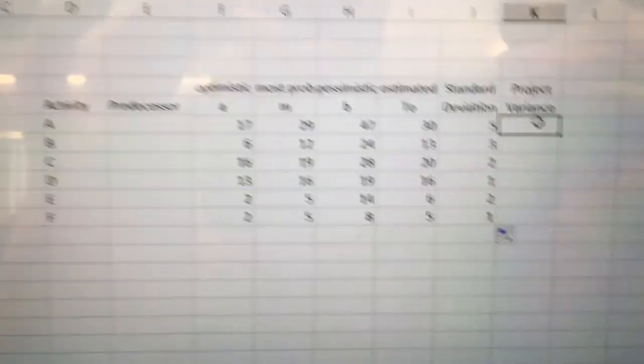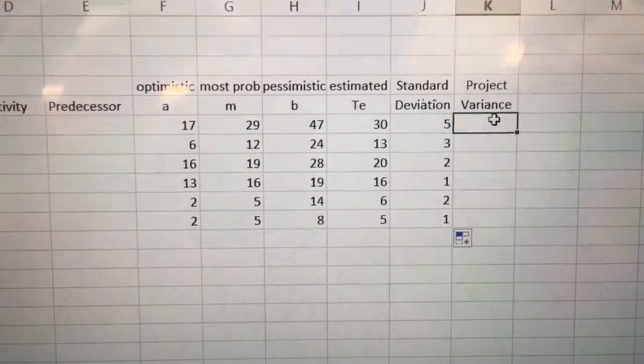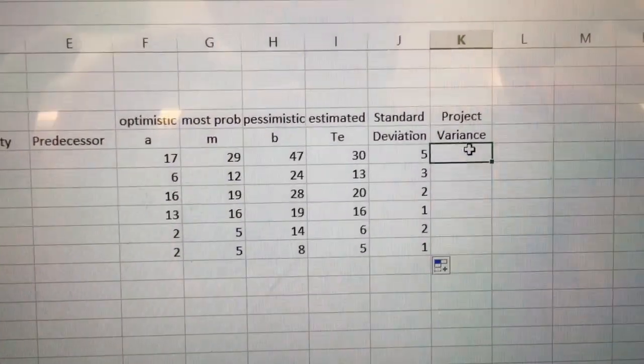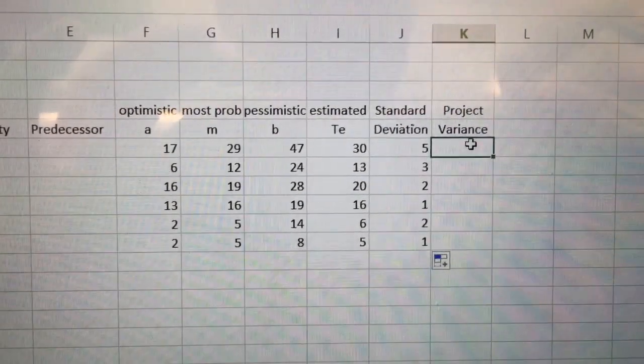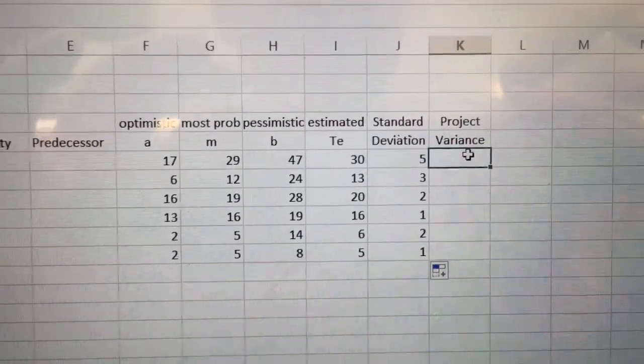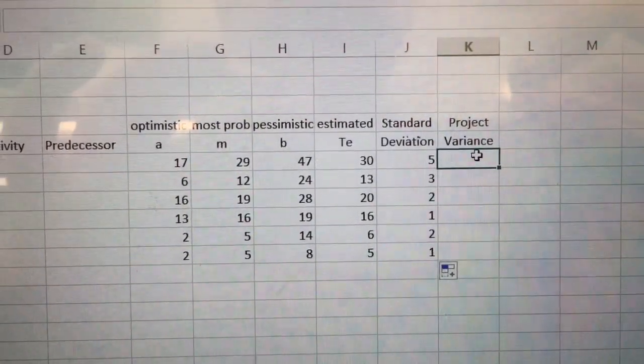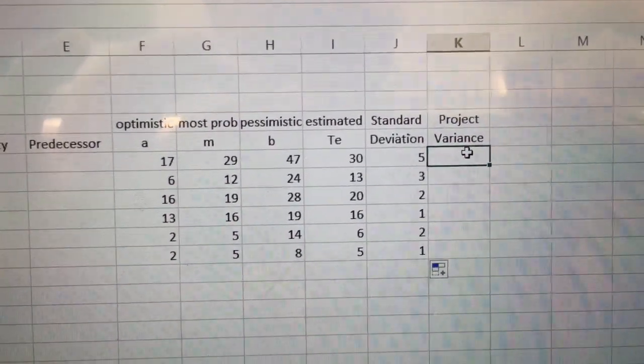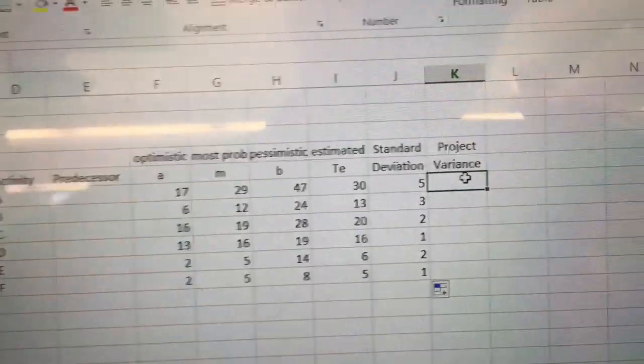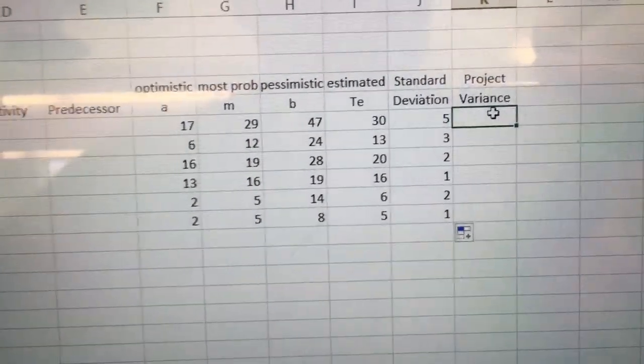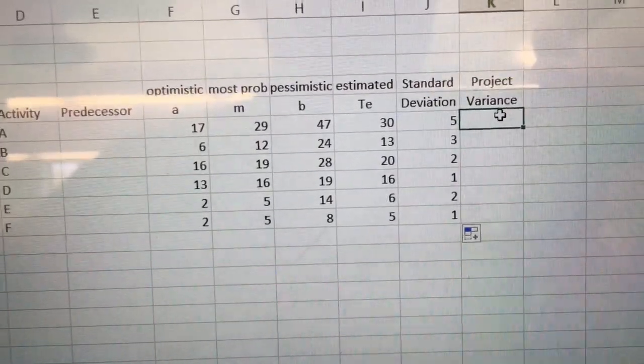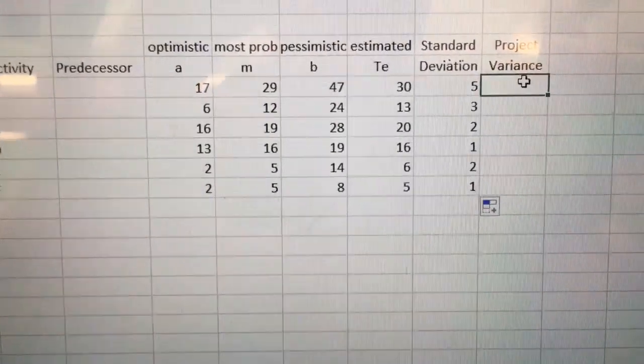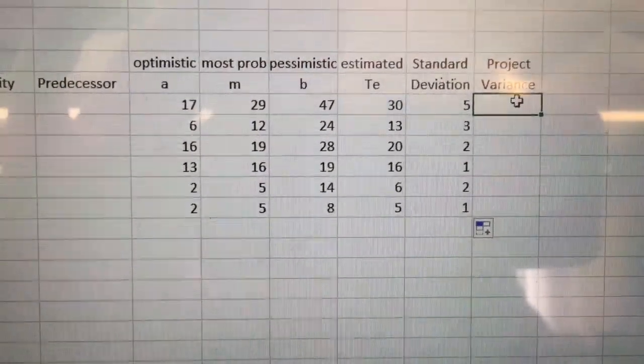Project variance. To get my project variance I'm going to take the sum of the critical path items. Actually the sum of the critical path standard deviations. Well make it even more complicated. I'm going to take the sum, well the square root of the sum, of the standard of the, scratch that part. I'm going to take the square root of the sum of the standard deviation squared for the critical path. Doesn't make sense, stick with me. Basically let's do it one step at a time.